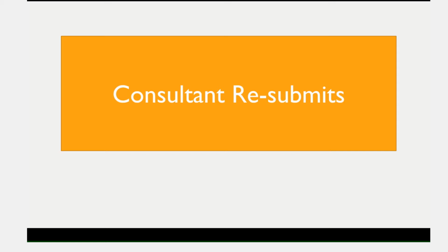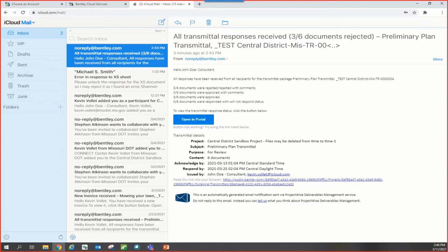Consultant resubmits. In this section, MoDOT resubmits or responds to an earlier consultant transmittal. We will show you how to view and respond to MoDOT's submittal package. Once MoDOT submits a response, the consultant will receive an email indicating the response is available. In the email, the consultant can see the breakdown of rejected and approved documents.